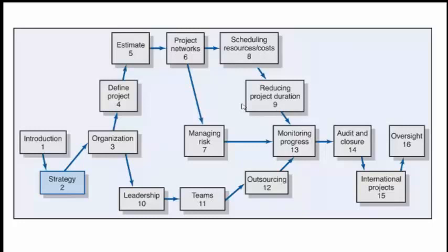Or another way is making things parallel. For example, previously there might be a dependency between tasks, so now you can assume some output and then try to do the things parallelly. Sometimes it might go to rework and things like that, but if it works out fine, that's also another way.